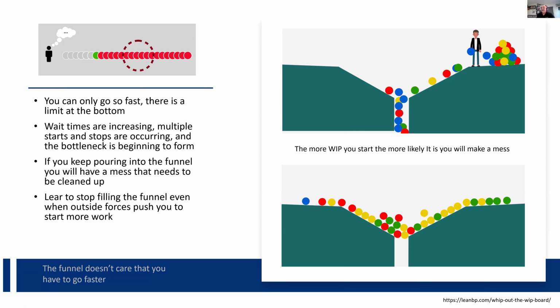The answer is, is our process good? Do we have good process? Are we efficient and effective on that shop floor? Some people will skip by that and say, well, we just need a bigger facility. Well, you just get a bigger headache. That may not be the answer in some ways. I would certainly rather have 20 people on the shop floor working 85 to 90% efficient every day than 35 people working 65% efficient, because 65% efficient is just a few clicks better than what you're going to get on the job site. So the fab shops have to be much more efficient than a job site.